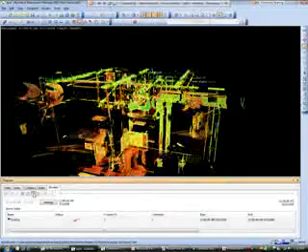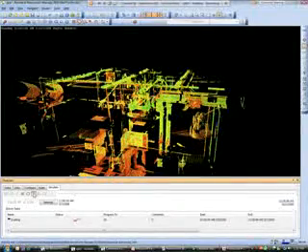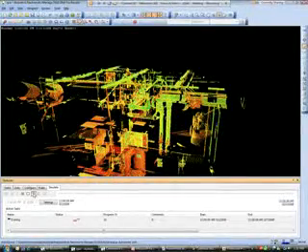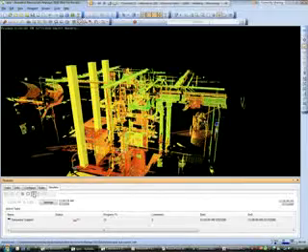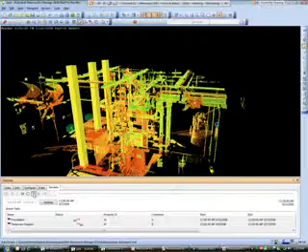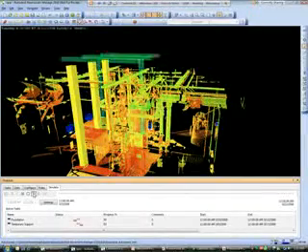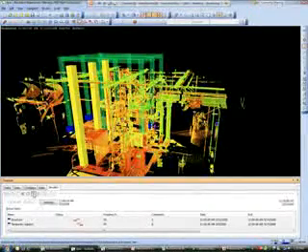And once we've done that, I can now run the simulation of this, and we're going to see the items being demolished, and we'll see the new structure being put in its place. So in the timeliner, it shows up just fine. And when we go back into Clash, I'll show you how we can now link timeliner into the clash detection module so that we can avoid some of these false positive tests.